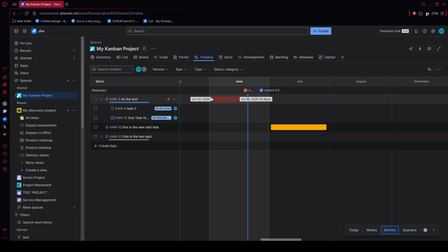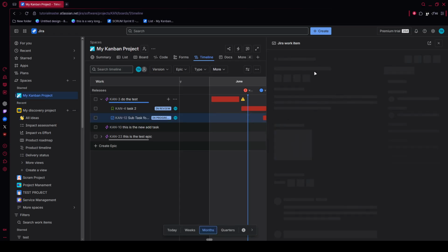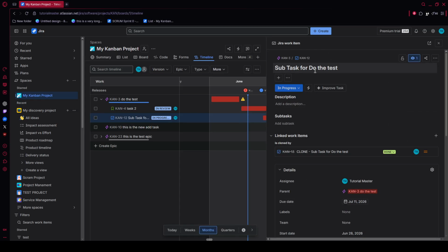When the timeline opens, you'll see a calendar-style grid designed for long-range planning. To begin building the structure, use the issue creation area directly on the timeline and enter a short, clear epic title. Keep the name concise and descriptive so it's easy to scan later. Then press enter to create that new parent epic on the timeline.